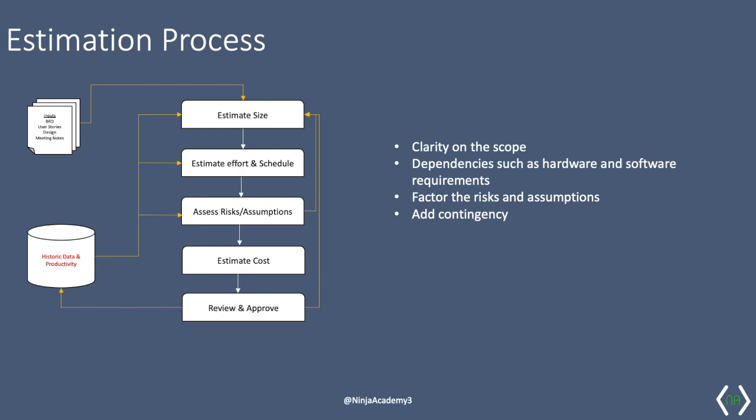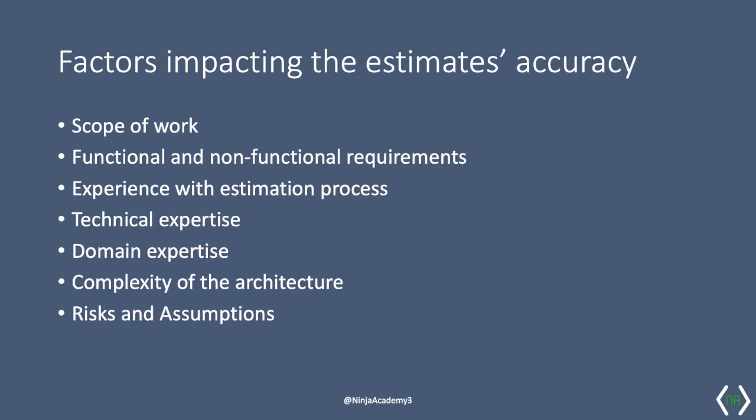It goes through the review process and the cycle repeats. Eventually, we will end up with a defined estimate for size, effort, and cost of the project. Approved estimates are updated in the historic data for future use, and the team moves on to the next phase of the project.